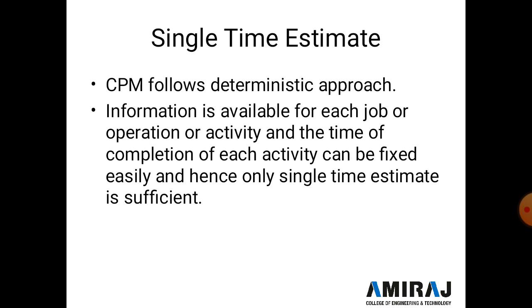CPM follows the deterministic approach. Since information is available for each job or operation and the completion time of the activity can be fixed easily, only a single time estimate is sufficient. No complex calculation is required — simply sum all the activities' times to get the total duration to complete the project.